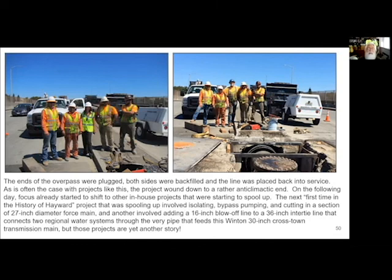One quick last question. Did it take a long time to get Caltrans to give you the okay to do this? No, because I approached them, and I sat there and lied like a rug and said that this had just happened. I didn't mention that this thing had been off for a year. I said it's a critical transmission main, which it is, and we need to move on this. When emergencies happen, all of a sudden all the regulatory roadblocks just evaporate. But you have to take advantage of it when they occur, because otherwise they start becoming nightmares. If you don't convince people that you need to get in and get out, then that's that.